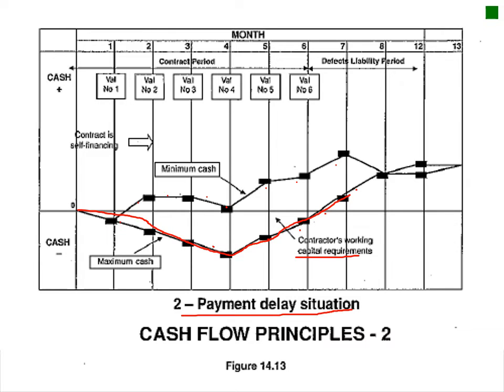Okay, so this is your worst case scenario, sorry, here at the bottom, and your best case scenario here at the top. Okay, and that's just the buffer that you usually build in. So this is the maximum amount of working capital that you need to plan for.